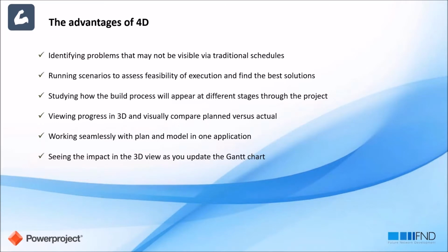What are the advantages of using 4D scheduling? You can identify problems that may not be visible via traditional schedules, like, for example, the build order of particular products. It's not a usual situation that you can read this from just the schedule in a project management tool.